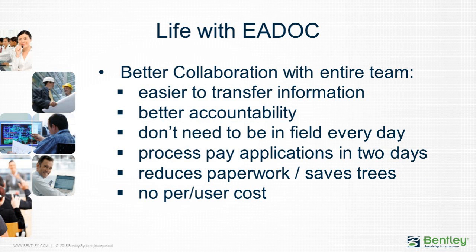Transfer information between. Right now with the EADOC, we are in the middle. The contractor can still send information to the design team. We did not stop that, except we put ourselves in between those two guys. It means if an email and information went to the architect, at the same time it goes to us. Anything that the architect sent to the contractor goes through us. So now we have a better way of controlling information flowing between the two.